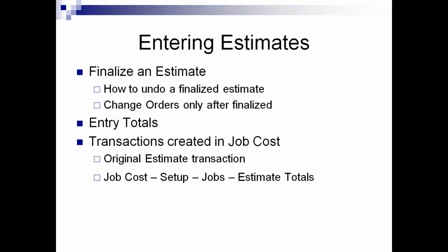All right, so I want to point out a few things about estimates. You can enter estimates multiple ways in Sage 300. You can import an estimate either from an Excel spreadsheet that you've created, or if you have the Sage 300 estimating product, you can output a file from there and import that into Sage 300. You can also manually enter an estimate either through job cost or through project management.